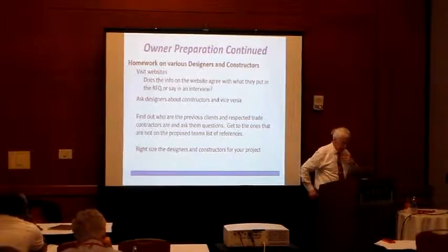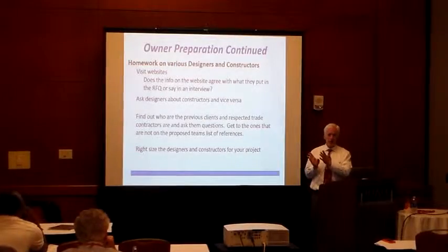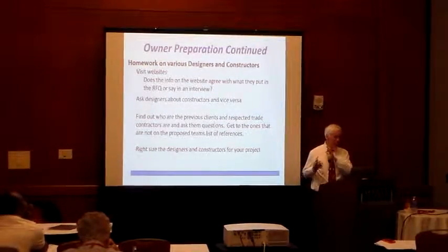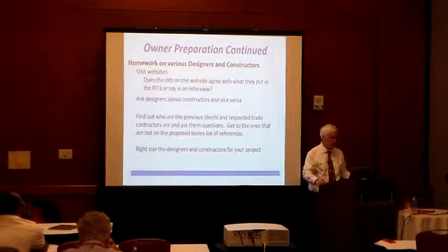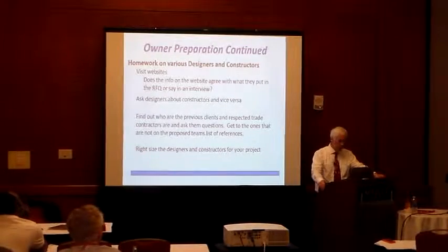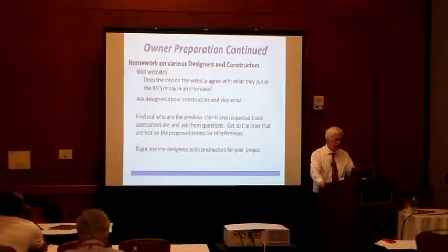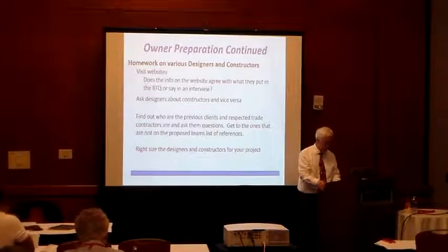Again, all of this applies to both the contractor and the designer. Ask the designers about the contractors. Ask the contractors about the designers. Find out who previous clients are. Find out who the respected subcontractors in the area are and ask them, what do you think of this contractor? And get the ones that are not on the proposed team's list of references. Try to get beyond those. And then make sure that you right-size both the designer and the contractor for your project.